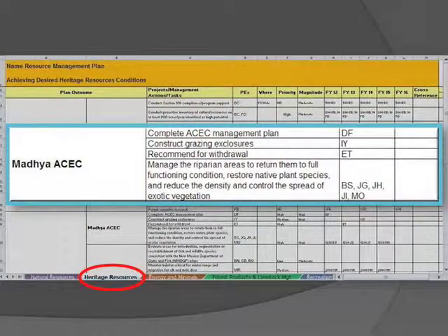So how about special designations? We designated and expanded several ACECs in the RMP, so we created a row for each ACEC and then looked at the management objectives to identify specific projects to undertake within each. Since some ACECs require activity plans, develop an activity plan was the first item we might have used. I imagine we'll fill in the projects that come out of these plans once they're completed.